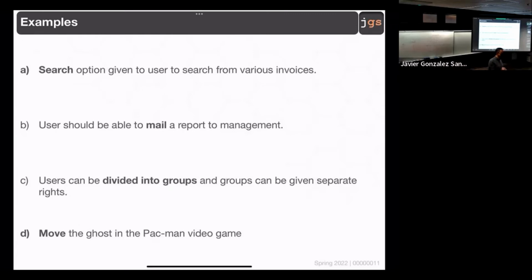That is an activity. What is the requirement? Sending the email. Sending the email implies implementing that graphical user interface, implementing the functionality, the listener for all the elements that I described. That is a requirement, because that is going to take you days or maybe weeks. You need to think about the estimation, days or hours. Better?